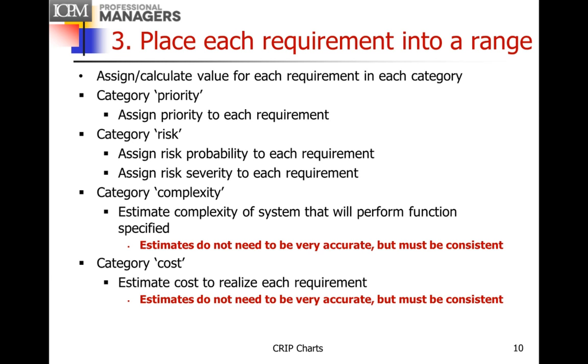And the estimates don't have to be very accurate, which is a nice feature of the CRIP approach. They don't have to be accurate, but they have to be consistent. So it all has to be done the same way.